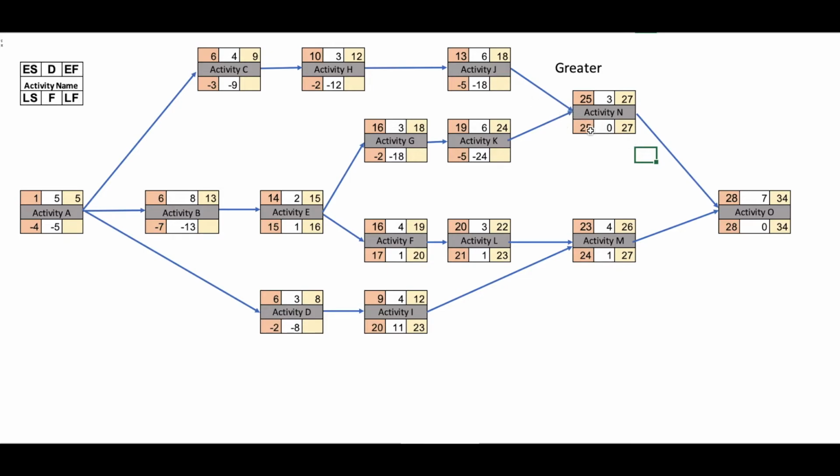So there is something wrong, I guess. No. Okay, 27. So this is on critical path. 24. So this is our critical path. This will be activity K on critical, activity G on critical, 0 float. So here 19 minus 1, 18. So we have 6 days float on activity H. 15. We have 6 days float on activity C.